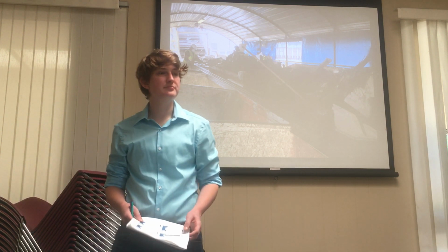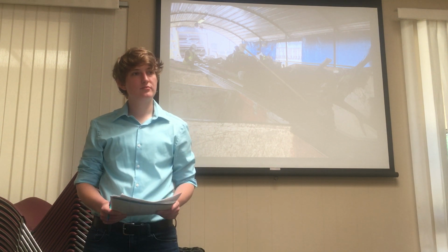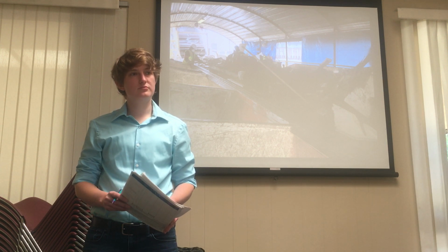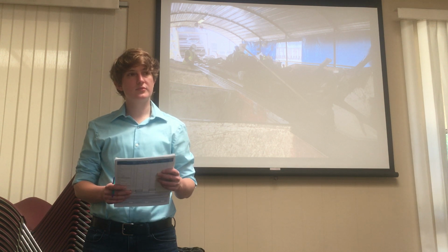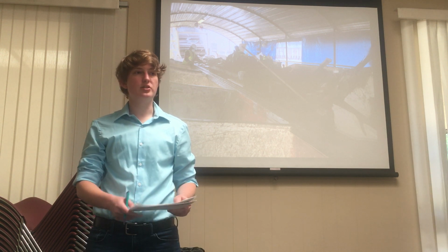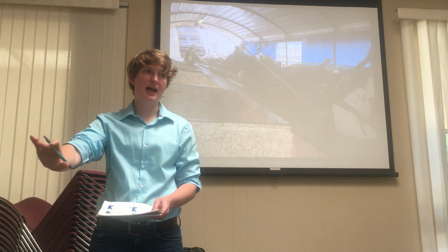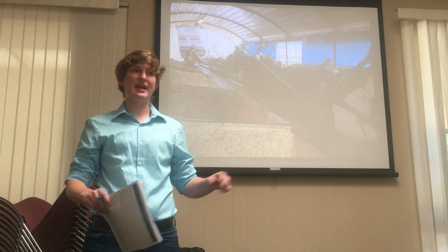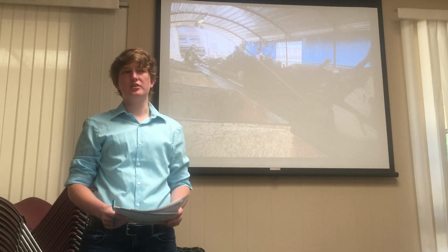But it'd be safe to assume primarily in a construction job, the excavation work, concrete, and dirt usually go directly into a truck for off-haul, and everything else goes into the bin. Is that the kind of separation that you would expect to have? Is that the primary concern, the dirt being mixed with wood and sheetrock and everything else? It's definitely a good practice to separate out the excavation materials and have that go out separately from the mixed C&D. But just in general, mixing any kinds of materials is going to make the diversion less. It's not just the dirt.